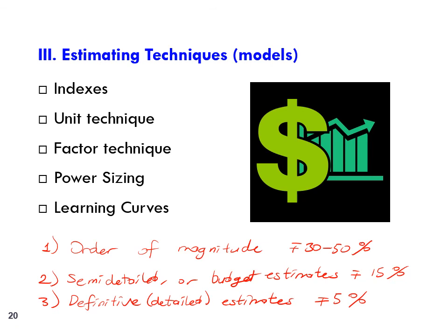Of course, as I told you, the selection of the detail and accuracy, or the category of estimates to be used, depends on the time and effort that is available, the difficulty of estimating the items in question, the methods or techniques that we employ, the qualifications of the estimators, and the sensitivity of the study results to particular factor estimates. The level of detail and accuracy of estimates depends on these factors.